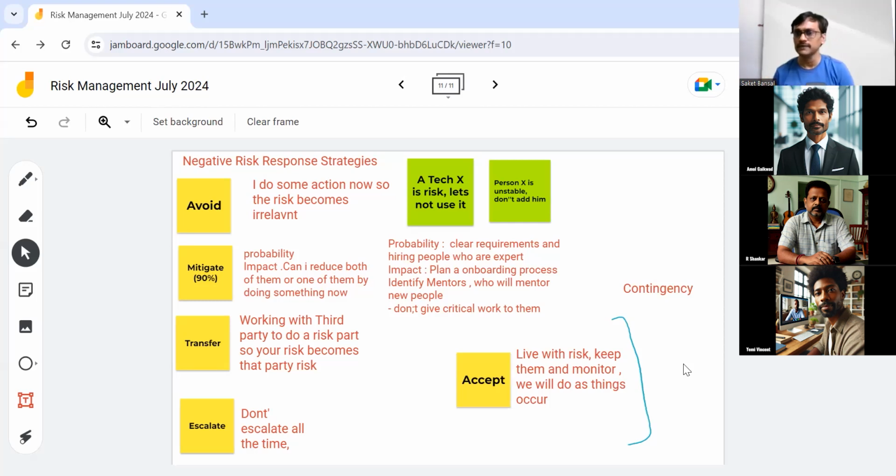So we will plan our contingency based on our accepted risk. Now, some of you will ask, what percent contingency can there be? How much contingency can I put in a project? There is no formula. It is not like you can have a 10% or 20% contingency. In your company, you may have it. Your company may say we always keep 10% of project duration as contingency for all the possible unknown risks we can get later on. That's a possibility. But usually in the PMP exam, we do a reserve analysis.